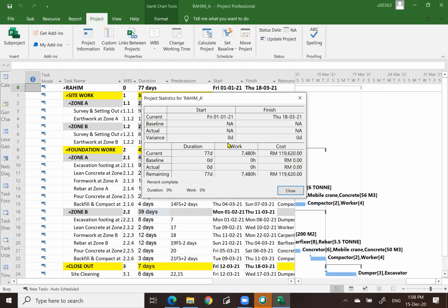If you do not have the picture of now, then how are you going to compare with the future pictures? You simply cannot. So similar concept with Microsoft Project: if you want to make a comparison with the actual, the plan values or data must be logged or captured by the computer. How to capture that is by setting your file with a baseline.